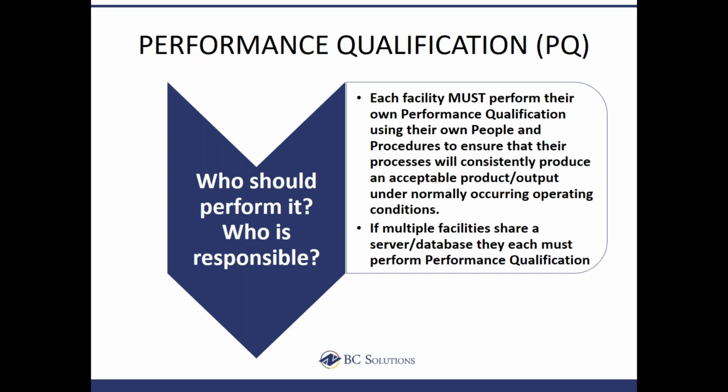And who should do it? Well, if you're a multi-site, each of your facilities is responsible for their own PQ. I mean each facility, not each server, but each facility must perform their own performance qualification using their own people and procedures to ensure that their processes will consistently produce an acceptable output or product under normally occurring operating conditions. And again, if you're multiple facilities, we mean that each facility has their own SOPs and their own people, and therefore must perform their own PQ.